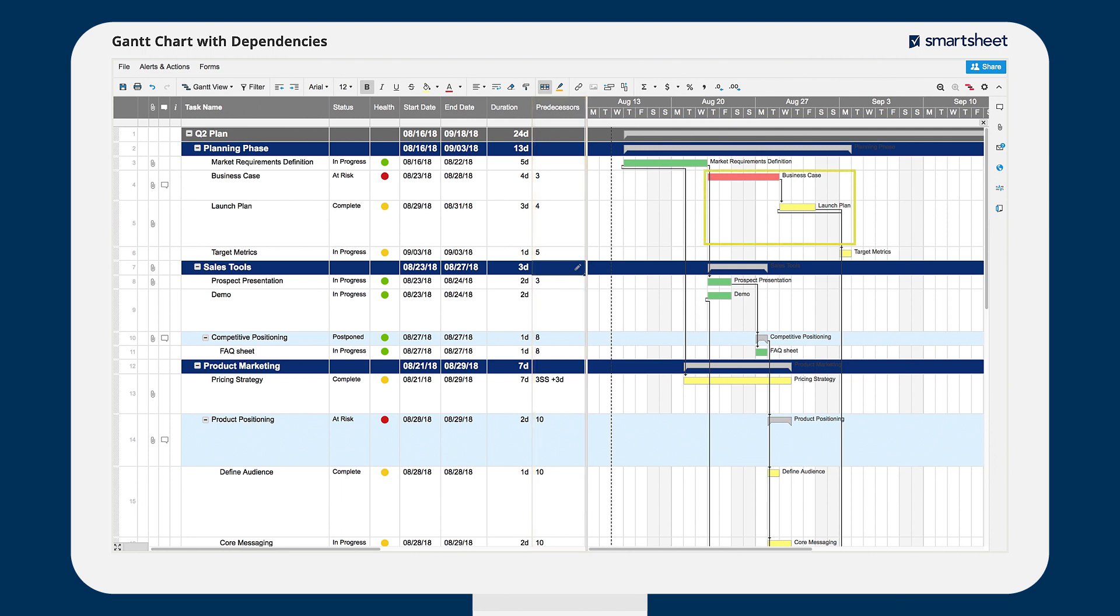The dependent task's start date is set to begin one workday after the predecessor's finish date. This is a finish to start dependency.